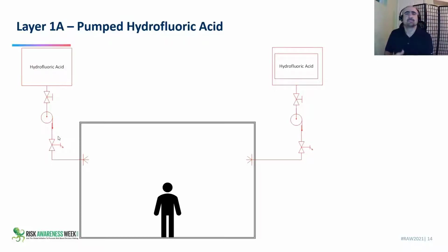Let's say that we've got a 10% chance of failure of each system. So pump one, the whole system here, 10% failure, that one, 10% failure, because HF, the hydrofluoric acid, is really nasty. It destroys metals, for example. So it's hard on systems. So maybe 10% chance of failure for each. Then we need to ask ourselves about correlation. What causes are correlated that would make both pumps fail at the same time?